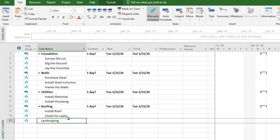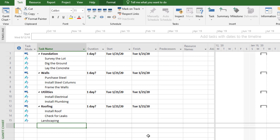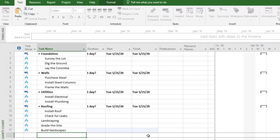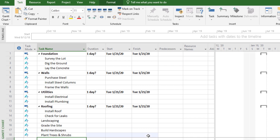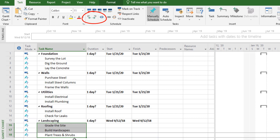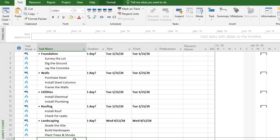Underneath landscaping, we're going to do a few things: grade the site to get it ready, build some hardscapes like some nice rock formations, and then plant some trees and shrubs. Those are now listed in their own categories — we want them to roll up under landscaping. So we'll select those three tasks, indent them, and put them underneath landscaping so they're all together in one group.